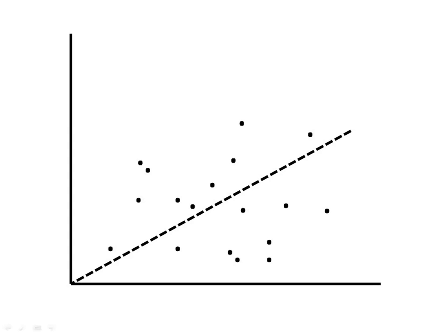So at the most basic level, you could take a typical rise over run graph and calculate the average of all the data points that you have and predict off of that. So for example, maybe your data points are the number of man hours it takes to perform a certain task. So you have maybe multiple different projects where you've done that task. You can see the man hours for each one of those projects that were used to do that task. And then you come up with an average, and it's able to indicate exactly and predict for you where you should end up.